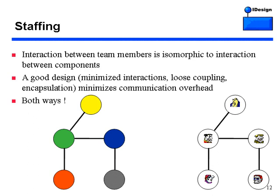It took me a long while to realize it goes both ways. If you have a good design on the whiteboard and assign it to Fred and Barney, and Fred doesn't talk to Barney because they don't like each other, that area in your design is going to be weak. When you assign work to developers, make sure you take into account the intra-team interactions and put developers who work well together on more coupled components.